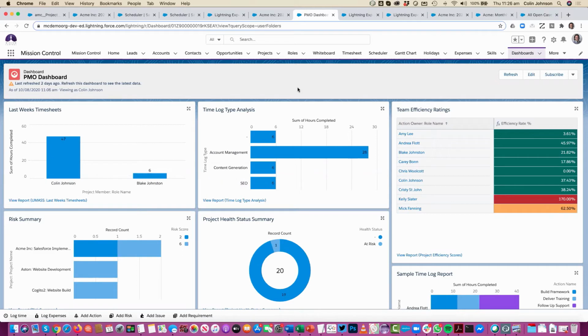So going back to what Becky was saying, how are we servicing this customer, and are we spending too much time over servicing it versus the amount of actual delivery work that we've done? In this example, you can see the majority of work has been on account management rather than actual work. So that could certainly be flagging up a red flag warning. If the account management is non-billable, we would certainly want to try and get an understanding of why